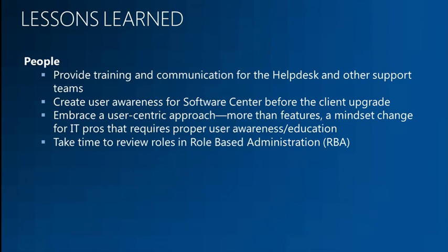When they click on All Programs, they will see something new got installed, and they will worry about where this new software came from. They will start calling the help desk, and we got calls. The lesson learned is that whenever you deploy the client, users should be made aware, whether through a centralized portal with a notification that we are upgrading from 2007 to 2012. It will reduce help desk calls if users can find out what is going on with their PC. So that's one of the lessons learned.